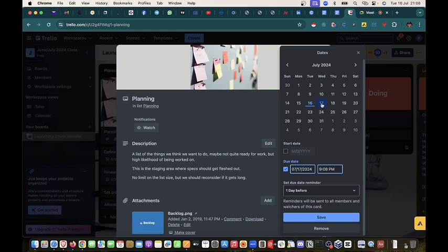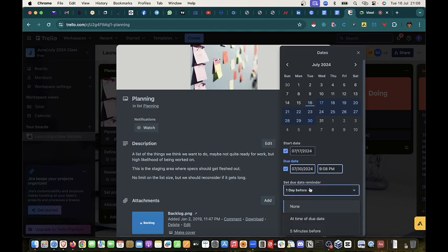So it says from July 17th, start date rather should be from July 17th, and the end date should be what? July 30th, just like he gave us. You understand? Once I've selected that, I will now click on, okay, what do I want? Do I want a day before our deadline, I should get an alert telling me that this planning phase we should be rounding up? You understand? So I'm going to set it that a day before that July 30th, let's get an alert.